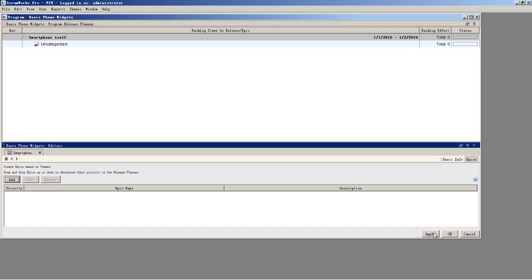As work progresses, the release burn down by date report projects a trend line based on the rate at which work is completed and compares that to the rate of scope change. It displays this historical data and extrapolates trend lines for each constituent product.